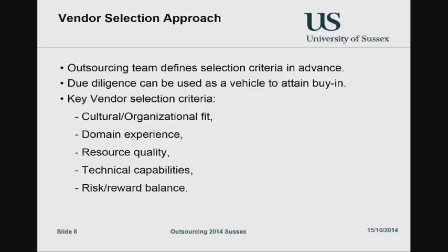Do they fit culturally and organisationally? Roughly the same size, roughly the same culture as us. Do they have explicit domain experience, i.e. they know something about my particular area, they're good quality, they're technically capable to do this. Up front, roughly speaking what they can do, we're going to check it, yeah? Don't take a vendor's word for anything. They're not dishonest, not at all. But they like to window dress things, yeah? We can do everything.